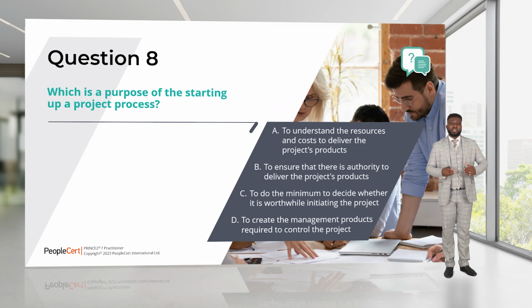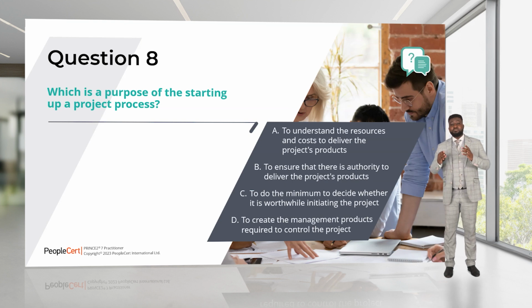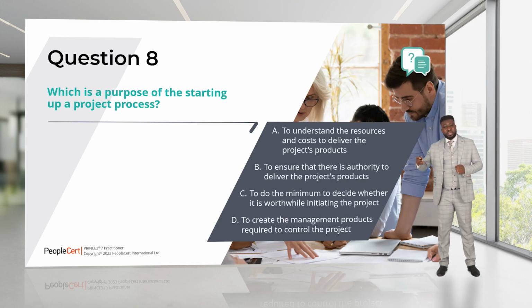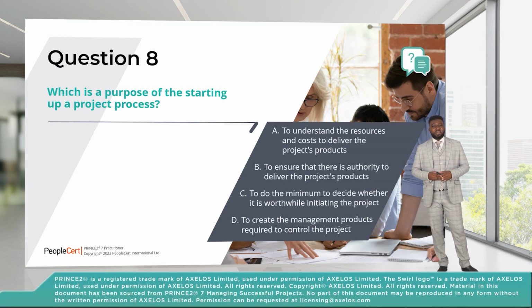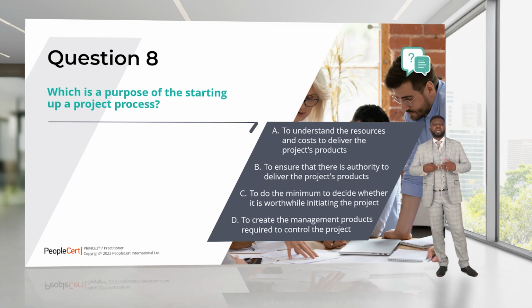This is where all of that takes place. So D is not the right answer. C says to do the minimum to decide whether it is worthwhile initiating a project. This is the purpose of your startup, to do the minimum to decide whether it is worthwhile to initiate a project. Does it make sense? Is it even a worthwhile project? Is it a good project? Before we start to commit a lot of resources to it. So C is your right answer.